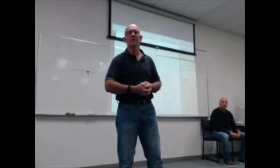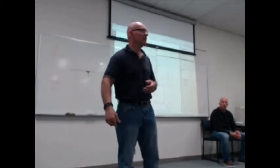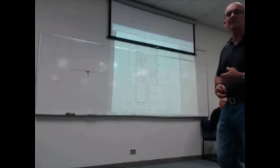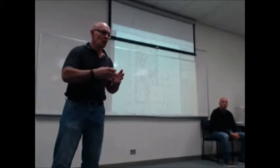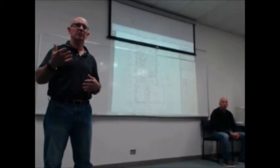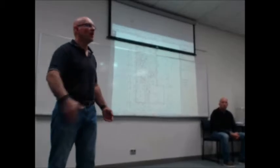I waterproof. What happens when the tiler comes in, or the carpet comes in, or whoever walks in, the client, they've got a stone on the shoe, and they walk through, and they just scratched all the waterproofing. The waterproofer is the tiler as well? No, like, same person did the job. But yeah, again, from waterproofing to tiling, anybody could have walked in there, done anything, scratched it, put a nail in, whatever. How can you prove it? Once it's been covered, you can't prove who did it.